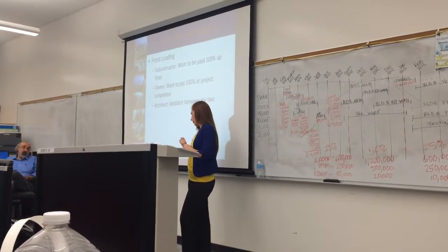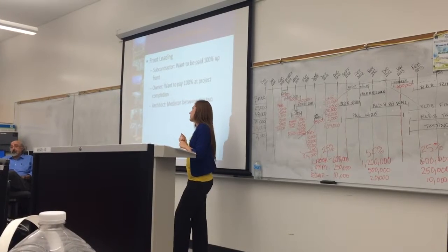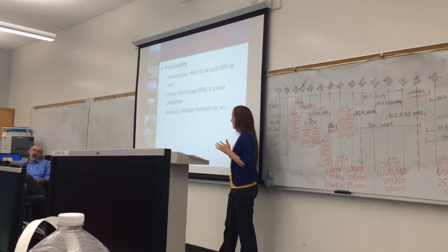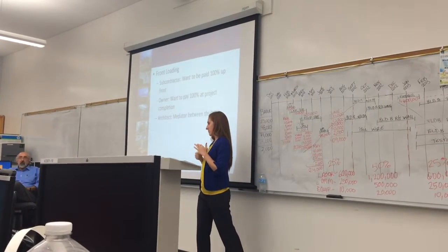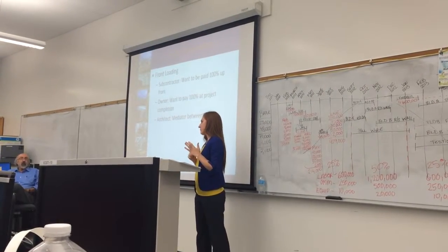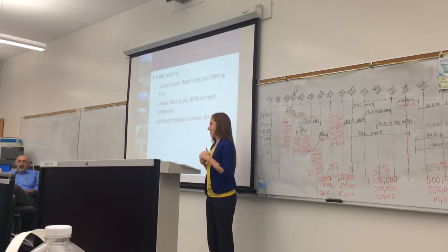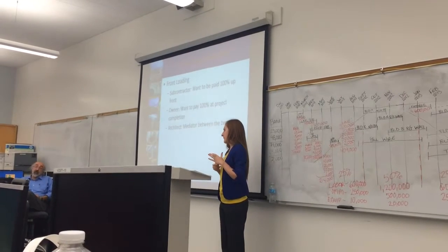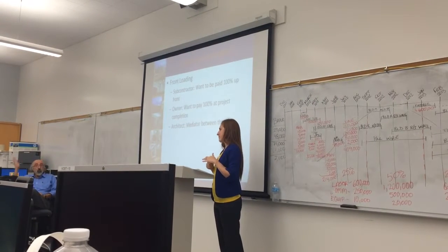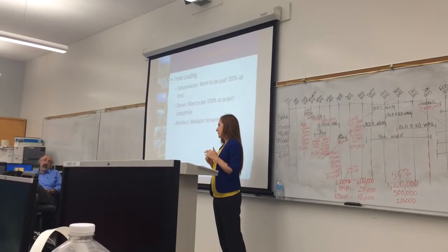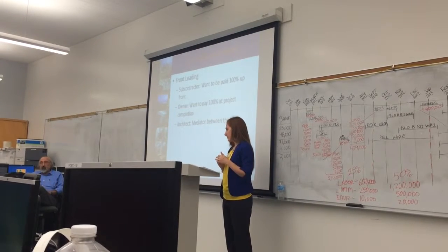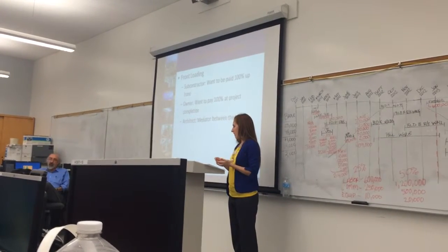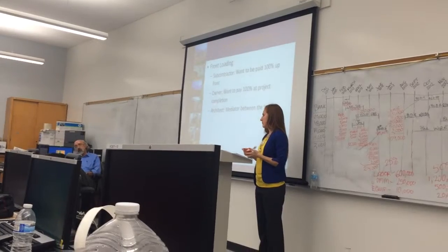And that's the issue with the change order, it's also an issue of reputation. Typically, if a job has anywhere from above 5% change orders, that's a lot of change orders, then that job comes under scrutiny. You start having it audited, and whoever the client is starts raising questions. If it's public money, then it's even worse. Usually if a project can stay within 3% to 5%, you're pretty good.